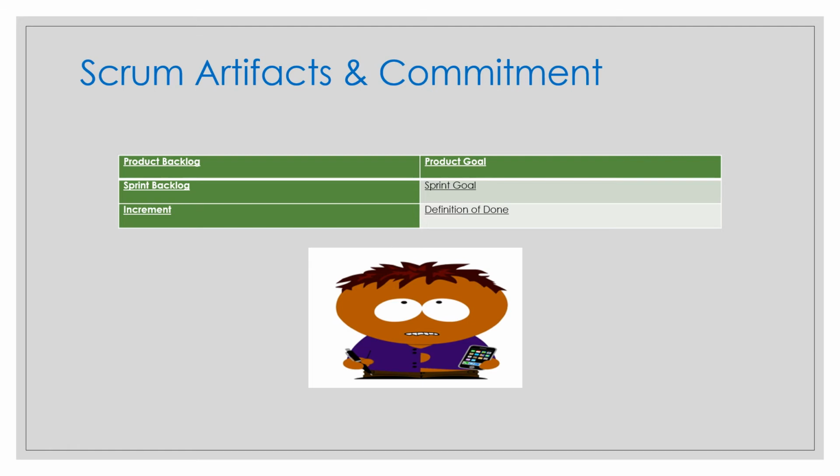The product backlog items that can be done by the Scrum team within one sprint are deemed ready for selection in the sprint planning event. So that is your DOR, right? Whatever in the refinement meeting they think can be added to the sprint backlog in the sprint planning event, that is your DOR, and that product backlog item that can be done by the Scrum team within one sprint will be chosen. They usually acquire this degree of transparency after refining these activities, and they will pull accordingly.